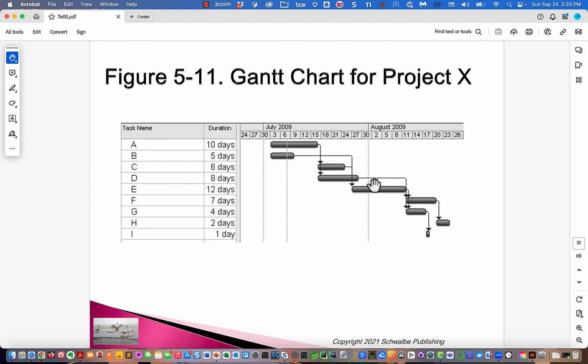Why later? Well, you have to wait for somebody to become available to take that task, so that when you go through and give realistic resources to a project planning tool and you ask it to level the schedule, nothing ever gets earlier. Nothing on the Gantt chart ever moves back to the left. It only gets pushed out to the right. Okay?